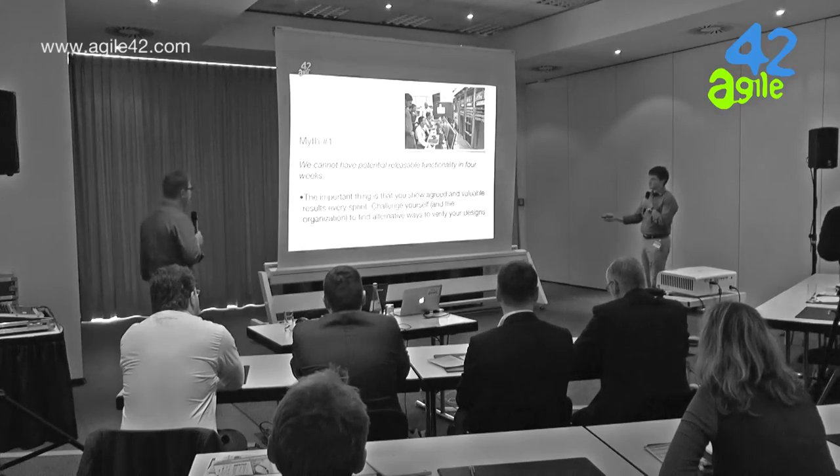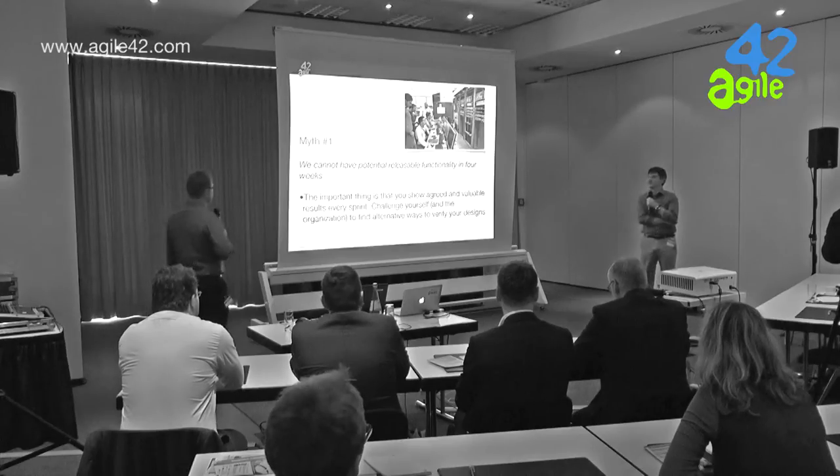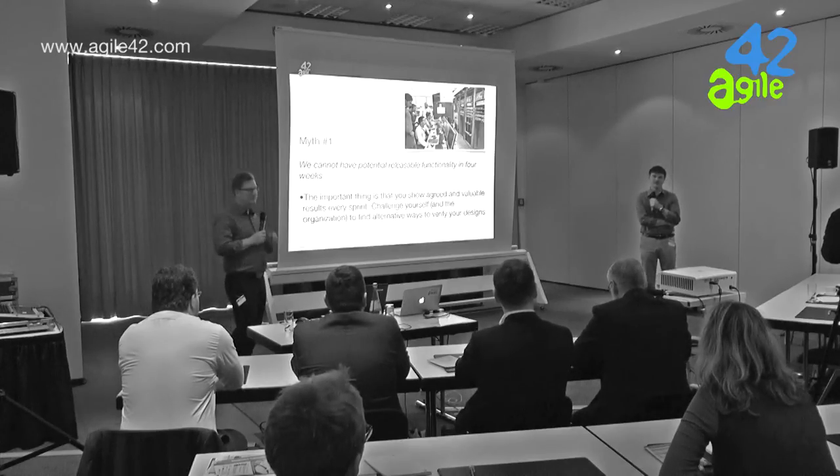From my side, my experience is that if you stick to the words potentially releasable functionality and you think of that as the things you want to sell to your client, you probably end up thinking that you can do a sellable product in 2 weeks. And the answer to that is probably no, you can't. Because if products are big enough, they require some time to develop. But what you can do every 2 weeks is validate assumptions, finding out if your guesses about the technology being right or wrong are okay or not.